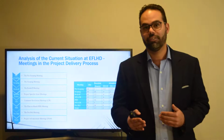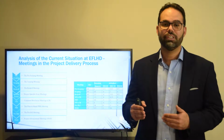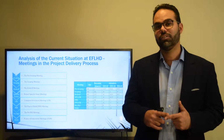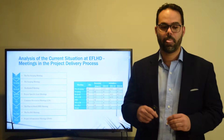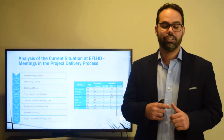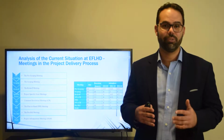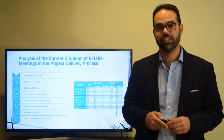Then we go to the kickoff meeting where that information is discussed and the functional managers provide the project managers with the activities and resources they need to complete the project, which are the basis for the schedule and project budget. You can have project-specific meetings for addressing specific issues. You would have 30 and 95% comment resolution meetings where everyone reviews the design documents and provides comments, and the comments are discussed during the meeting.